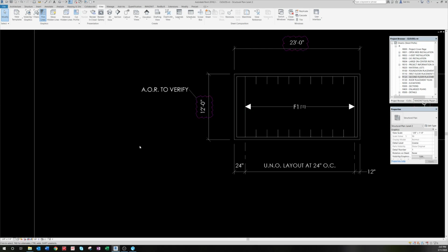Once we have our OFA set back and we are moving towards an AFP set, we need to know how to show the revisions made to our shop drawings. At RedBuilt, we use a revision symbol only to identify the areas or details that have changed, and not clouds. Here are 3 different scenarios. First, what do we do with a cloud that has been approved or verified as is with no change?